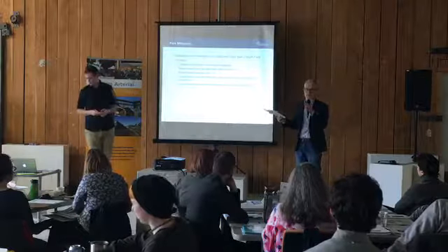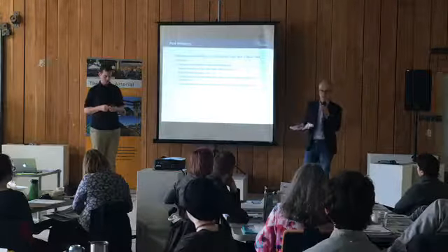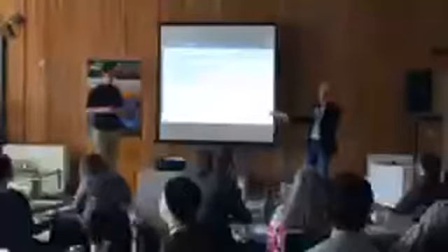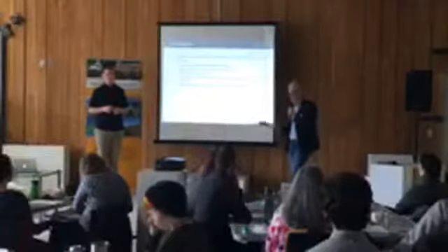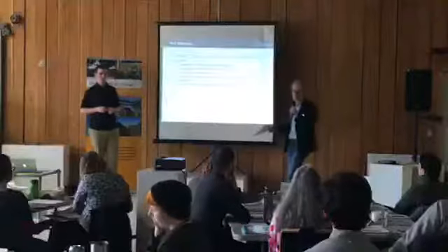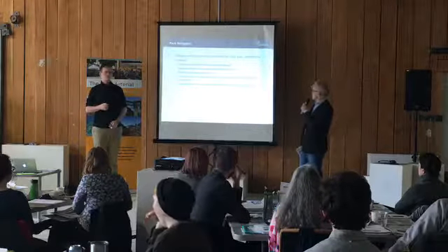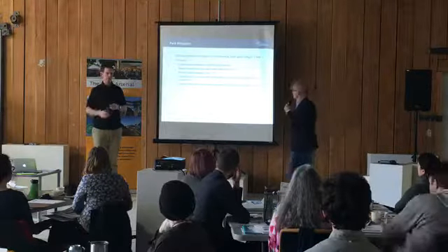If they come out, they have a value attached to them that's far greater than the tree that goes in to replace them, so that would be factored in. Planning and design costs associated with any park replanning and redesign because of a reconfiguration due to an option. Construction costs for affected park space outside of alignment boundaries.